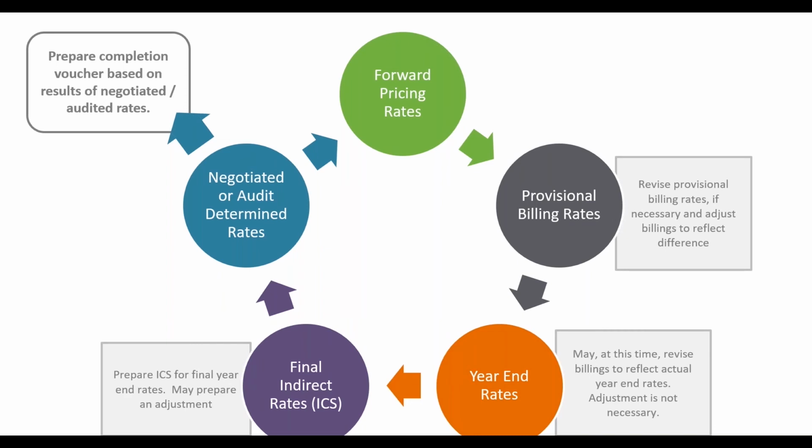During the year, there should be an active step to monitor your provisional billing rates to actuals to try to address any major fluctuations in those rates. So you can kind of get ahead of the curve if there is a large fluctuation in your actual rates versus your provisional. The reason why this is important is that you don't get into a situation where you might have overbilled a customer by a significant amount where it matters based off a contract type.